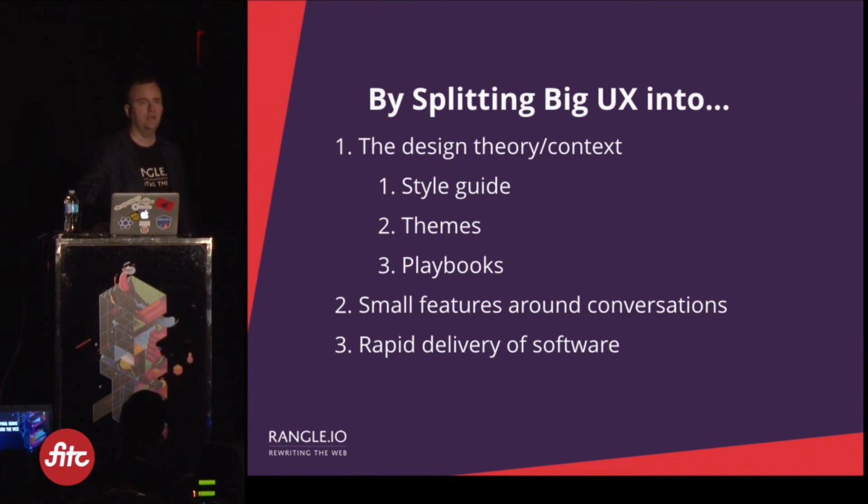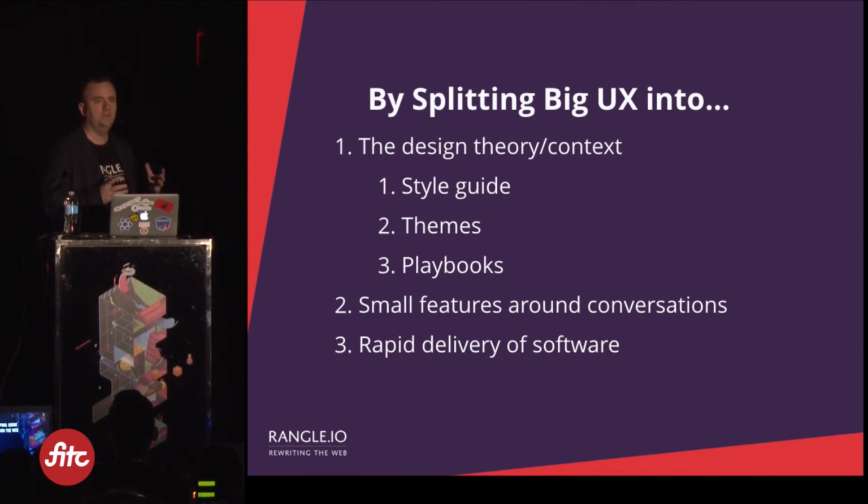They're working on one thing. Now QA comes back, and now they get this disruption. Design comes back, they have another interruption. The back-end team comes back, they have another interruption. So now you have developers, instead of just focusing and getting something closed out and shipped, working on 6, 7, 8, 9, 10, 12 things at once. And it completely destroys the team's effectiveness. It slows things down remarkably. So do you have the organizational context to solve for those problems?